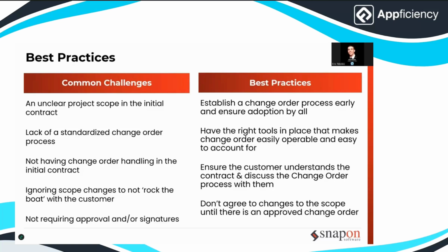The last thing you want is to complete extra work and hope for reimbursement later without documentation. And, speaking of documentation, verbal agreements aren't enough. It's okay to get a verbal green light to keep the project moving, but that should always be followed up with a written confirmation and a signed change order. That signed document protects both parties and ensures expectations are aligned.